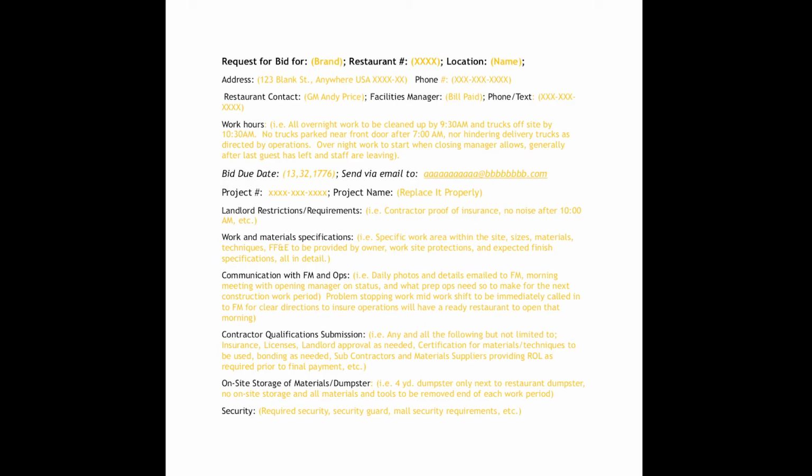And that standard form started off at the very beginning with the location, the phone number, the hours of operation, the developer limitations or landlord limitations, bid due date, where and when to submit the bids. Then you bring in the work scope details, and they have to be very specific and very accurate. The details would include exactly what materials and or products you want, how you want that work done, and when you want it done. What time of day is it going to be? Is it an overnight job, or is it something that's going to be done quickly during the day?